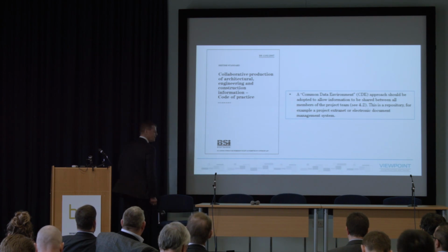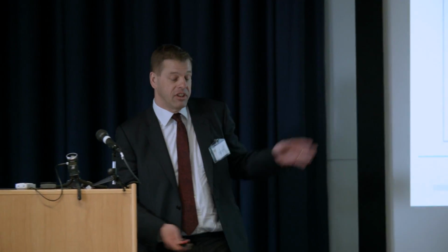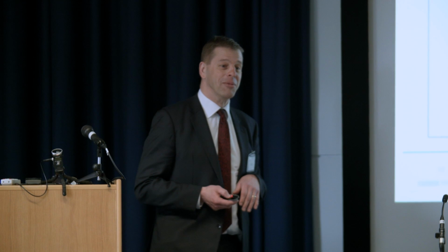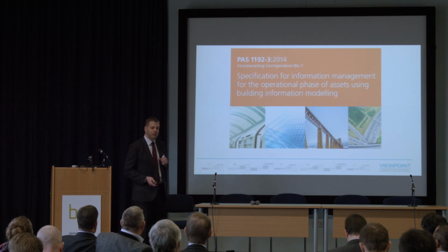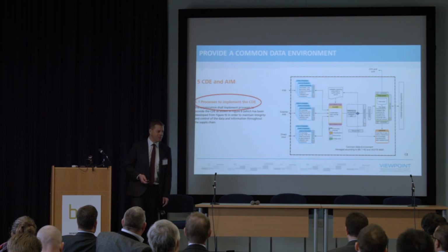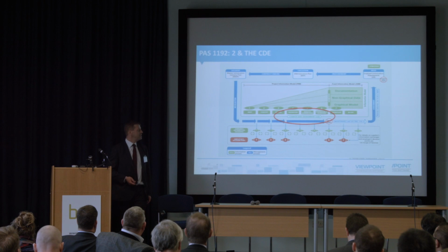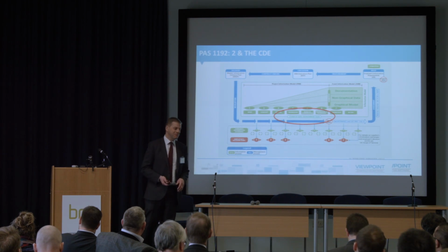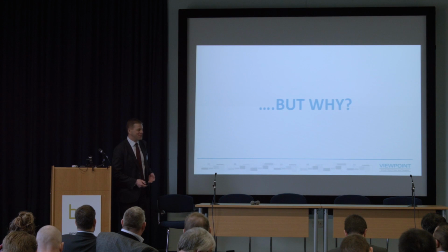So back in 2007, when BS 1192 came out, it told us that when we're working collaboratively, and this is just in exchange of digital data, we should use this thing, a common data environment. And it hasn't gone away. PAS 3, for the OPEX and strategic stages of an asset's lifetime, tells us that we must use a common data environment. PAS 2 tells us that we must use a common data environment. But of course, that doesn't actually tell us why we should use a common data environment.